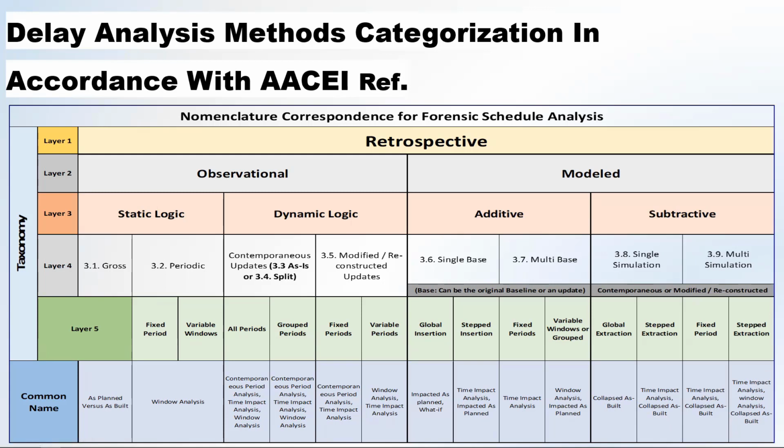That's why I normally have some conservation on the clause, the famous clause included in some contracts stating that we are going to go for this using time impact analysis. Because if we go to a respectable reference like the RP, we can find that there are multiple methods that can be called time impact analysis.